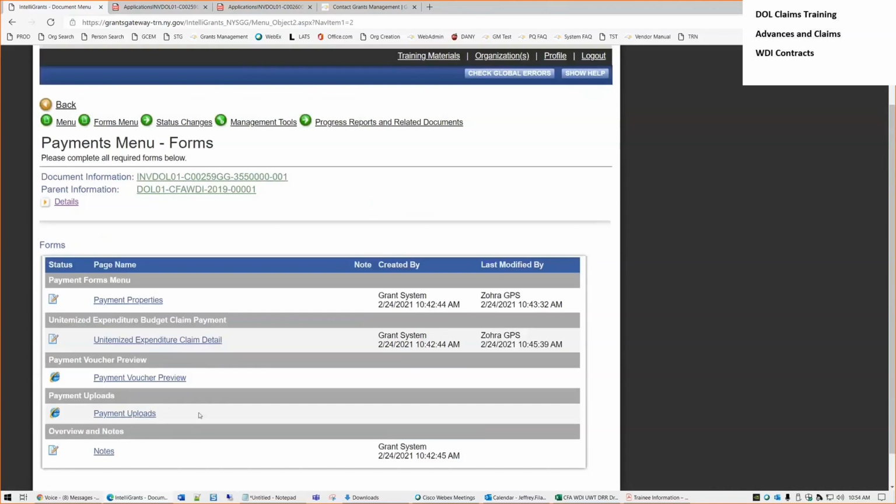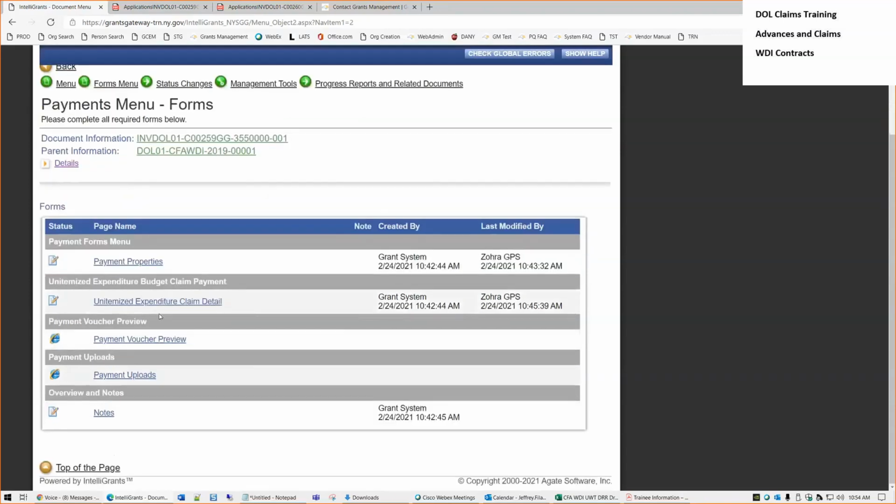So again, that would be a case where your reviewer looked at it, there was something that didn't match up right. They want to give you a chance to fix it instead of having to start over. They send it back to you in this status called payment info requested, and you go back in, you make your uploads, or you add another upload, and then you go to your status change and you submit it back to the program manager, the reviewer. So that may happen in certain cases. If they needed to adjust something in this form, they could do this for you. They could adjust the amounts here in the claim detail form.